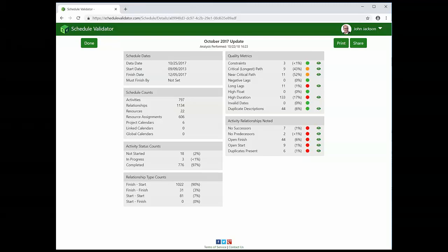Another one is near critical activities. You noticed in my chart a while ago, my plumber had 2 days of float before it impacted the critical path. If an event occurs that's more than 2 days to my plumber, then it's going to impact the critical path. That's called a near critical path. One of the features on this site, I can actually go in and establish the parameters.